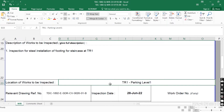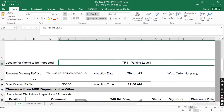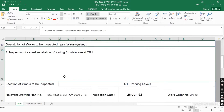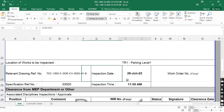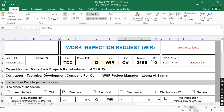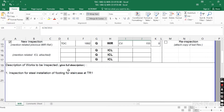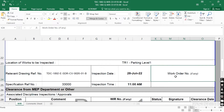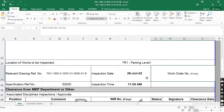After completing the description, you have to mention the inspection location — where the inspection will be carried out. For example: 'The staircase footing is located at Terminal 1, Parking Level 1.' Then for relevant drawing reference, write the shop drawing number or IFC drawing number and attach that drawing to this WIR, because the consultant will check all details against that drawing. Then write the inspection date — if today is 27 June you are submitting, the next day should be the inspection date — and mention the inspection time.